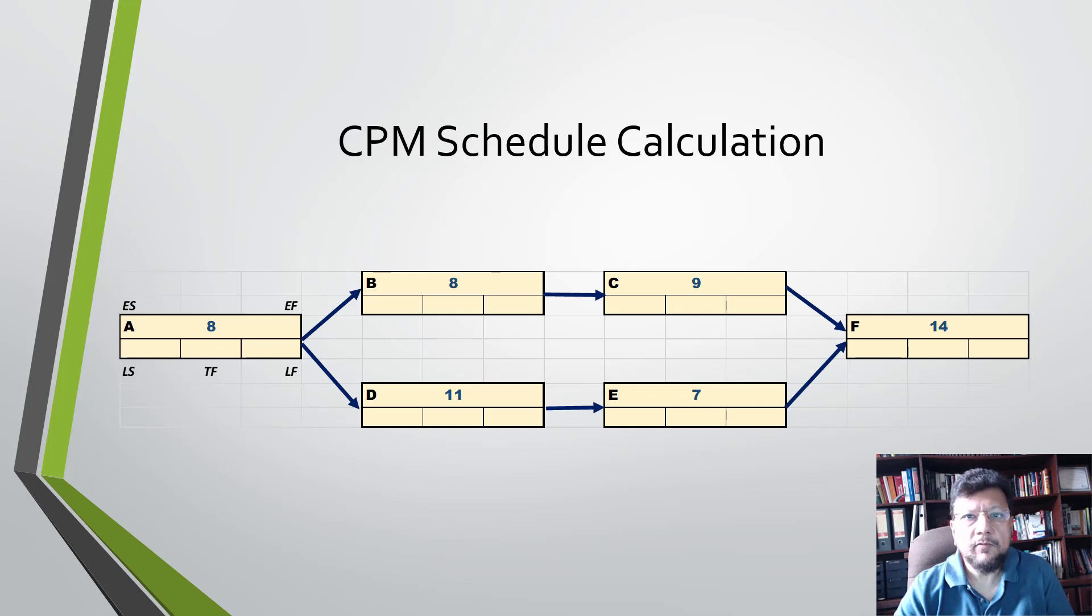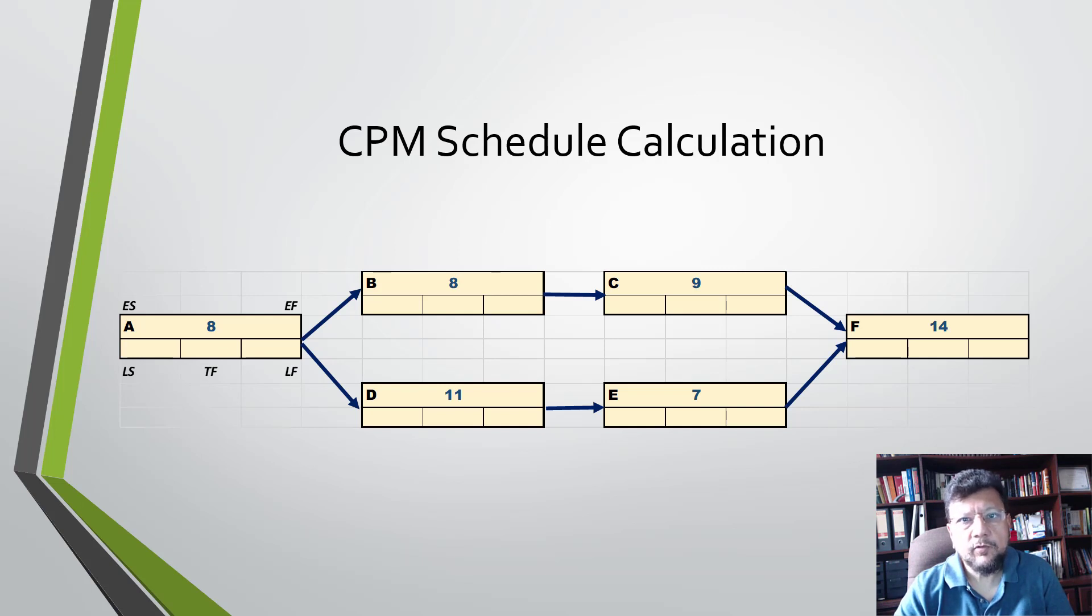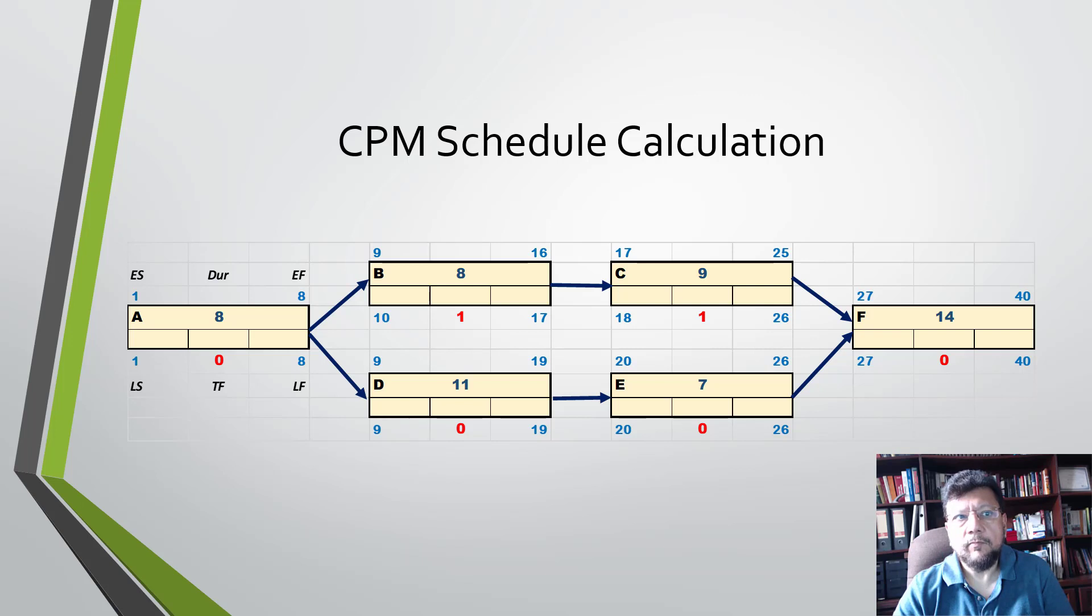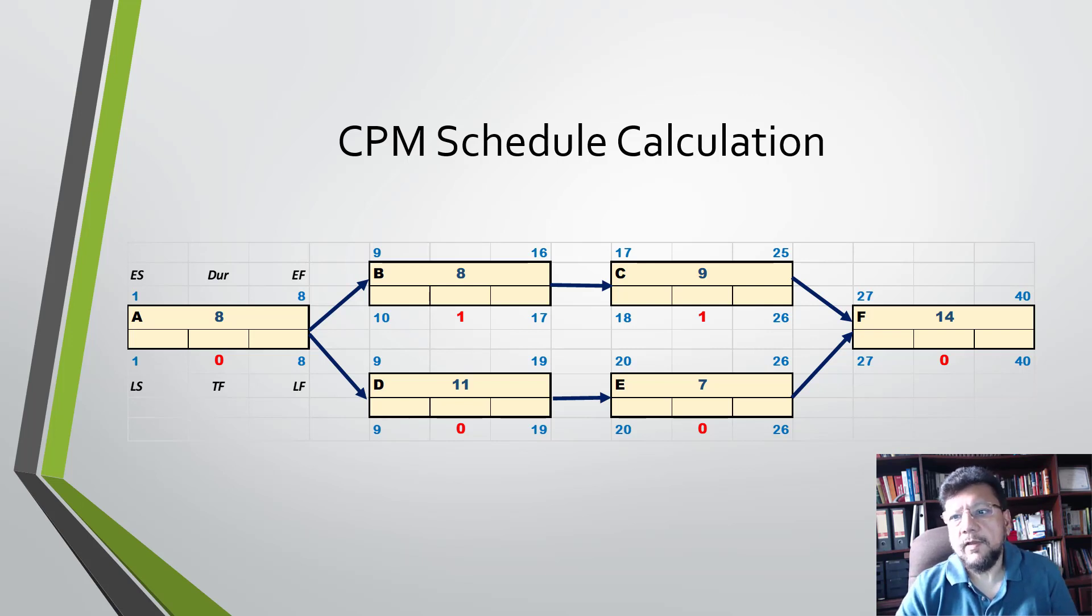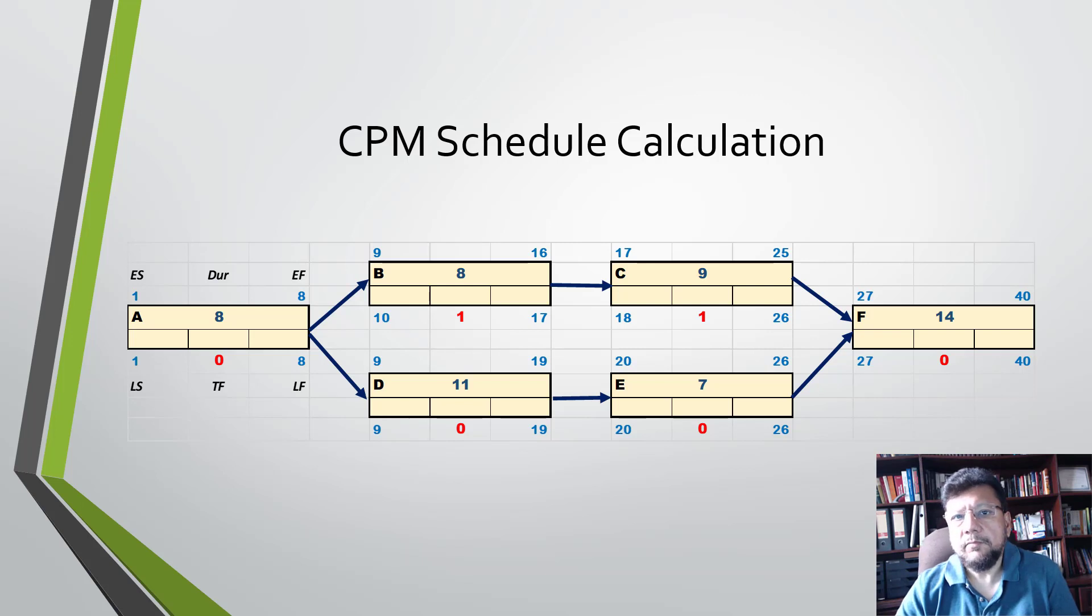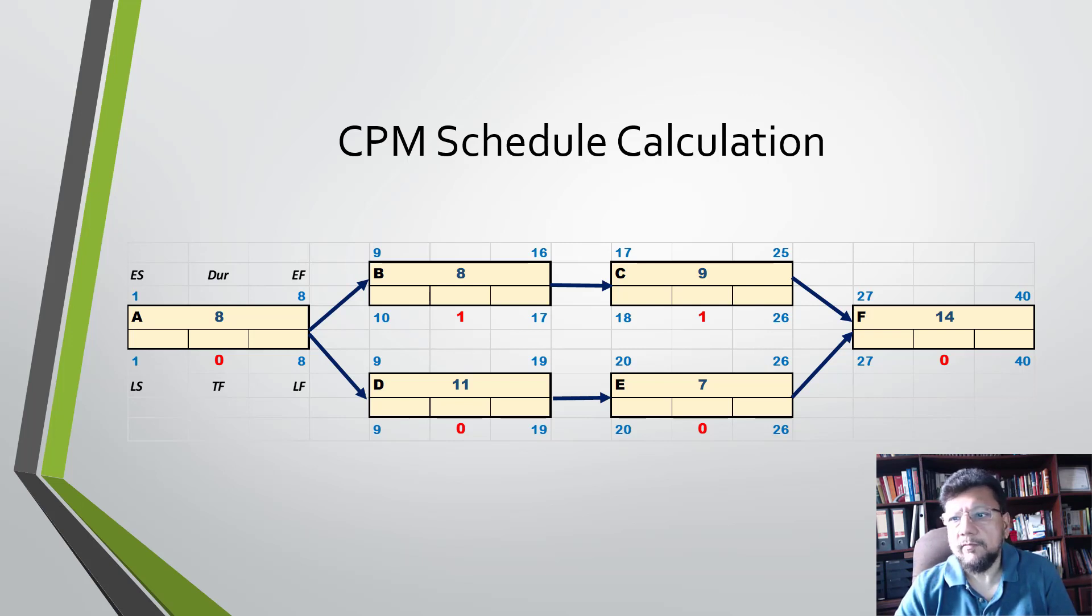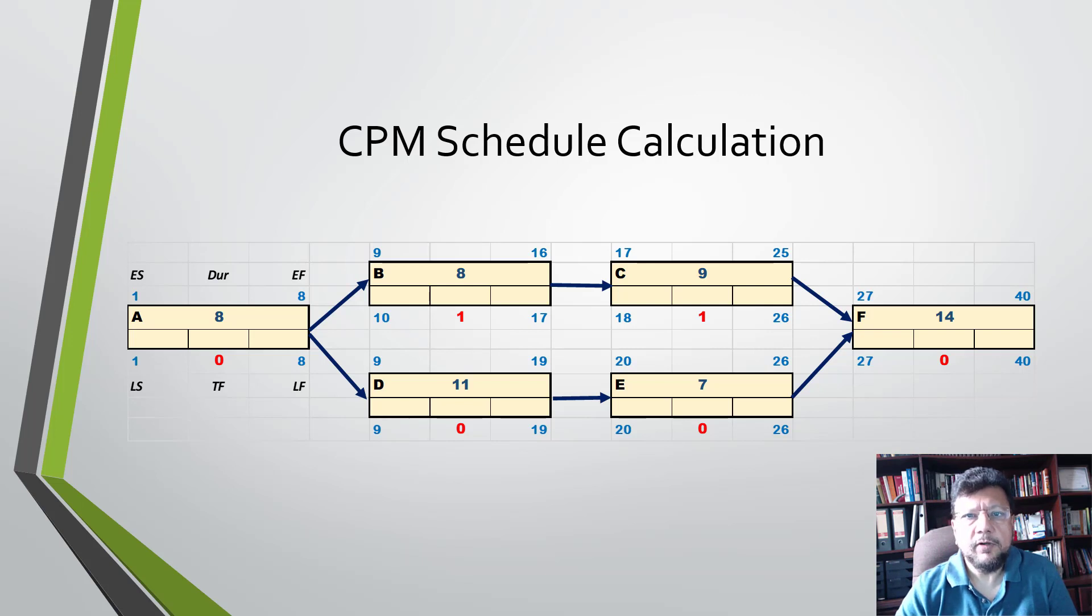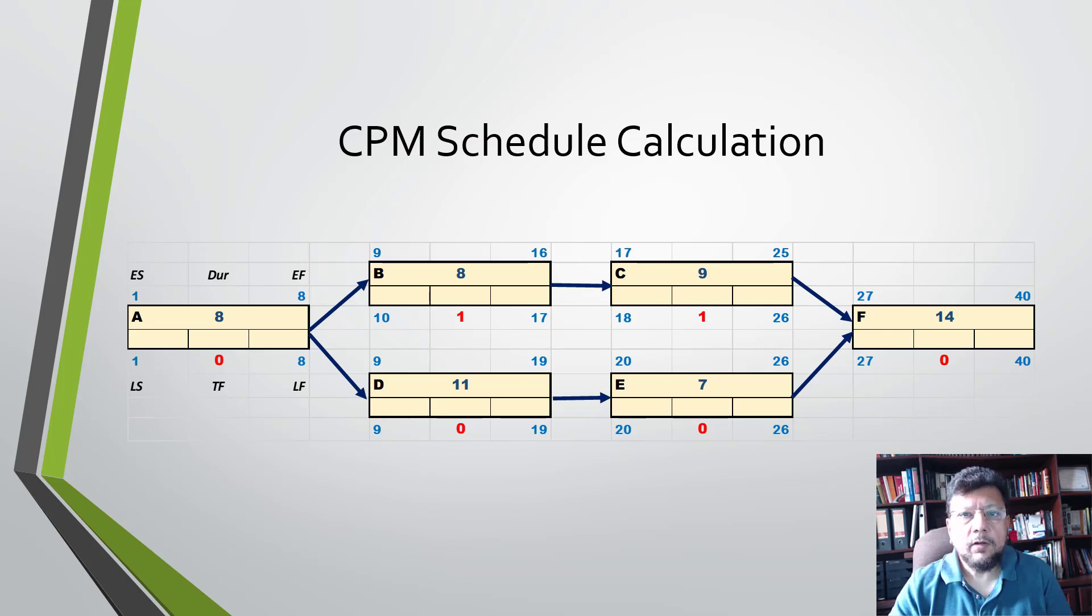All we need to do then is use a forward pass and a backward pass to compute the early and late dates, the floats, and the total project duration. Running this calculation, we can see that the schedule will take about 40 days to complete. The critical activities are A, D, E, and F.